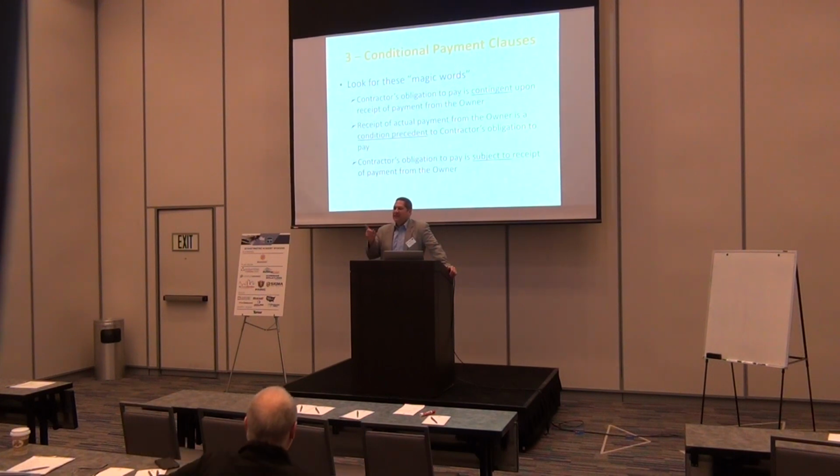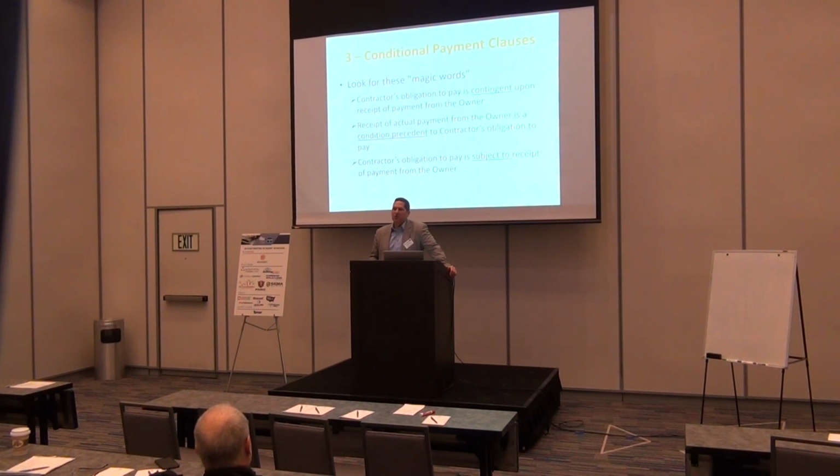But I think if it has that kind of language, the pay if paid type language, a court is probably going to enforce it as pay if paid. Because I think the one scenario says when the contractor gets paid, he has an obligation to pay you within so many days, so that if he doesn't, you can shut down your project, you can give notice of default, etc. As a subcontractor, a lot of times we don't know who the actual customer is. So with pay if paid, I can't run their credit or find who they are. I don't have a contract with them, so I'm extending credit.